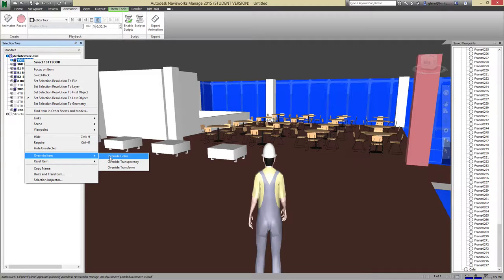That's what's cached. Good. There's this whole thing about file naming: you want the current file to always have the same name, and the old ones, like the one from last week, I'm going to pull out, rename, and put in my archive to keep structure.nwc. It could be a web-based shared drive. We don't have to be in the same space. Exactly, whether it's on Dropbox.